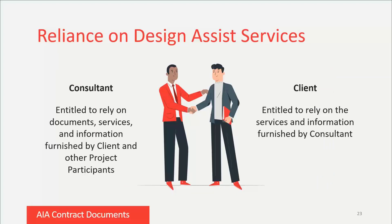To what degree can anyone rely on these design assist services? The consultant can rely on the adequacy, accuracy, completeness, and timeliness of all information and documents it receives from the CM and other project participants. Likewise, the CM and other project participants — including the architect — are entitled to rely on the accuracy, completeness, and timeliness of the services and information furnished by the consultant in its design assist deliverables. However, the architect still maintains responsibility for incorporating those design assist services into the design and identifying and resolving design conflicts.